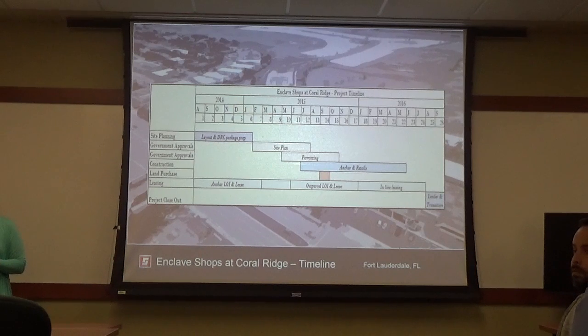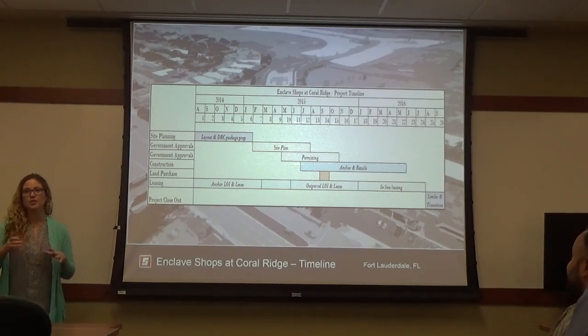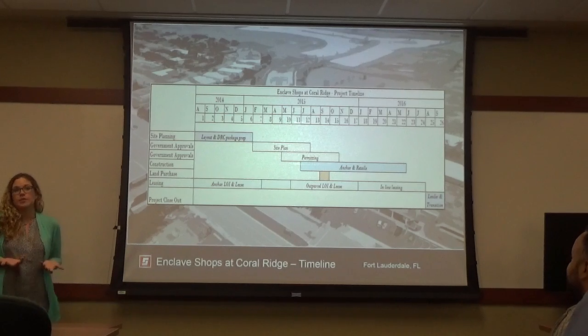Okay, so you said that it was a paperwork nightmare doing that transfer, that even you had to stop construction for 1 day. Why not do that at the beginning? Well, because you need to get your construction loan. I mean, you need to own the property in order to get your construction loan, in order to fund the project. So up to that point, we were self-funding the project.